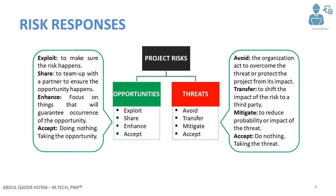For the negative risk or threat, the responses are avoid, transfer, mitigate, and accept. Avoid means the organization acts to overcome the threat or protect the project from its impacts. For example, if strong winds or a storm are expected during a specific part of your project timeline and it could negatively affect the project, you stop project work until that risk goes away. That is avoiding the risk.